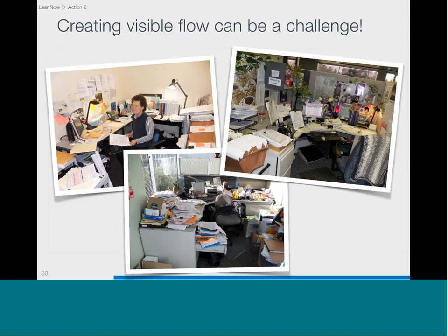So instead of tackling this really messy and disorganized area, we decided to find the work and then get the work up onto the kanban board. There may be a file on one of these desks that is that piece of work, but that work will also be represented on the kanban board. So we know where the work piece is, we know how much is in work in process, we know what's in the backlog, we know which work is blocked and which isn't, and we know what's waiting for a response from a customer or another party. Those are the kinds of things that the kanban board can tell us that we would never be able to ferret out of an organization that looked like this.